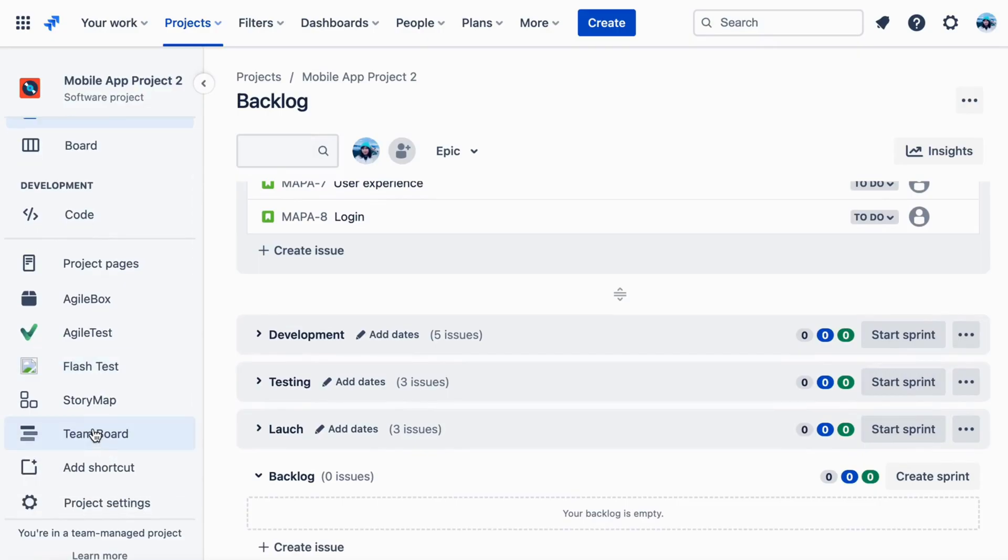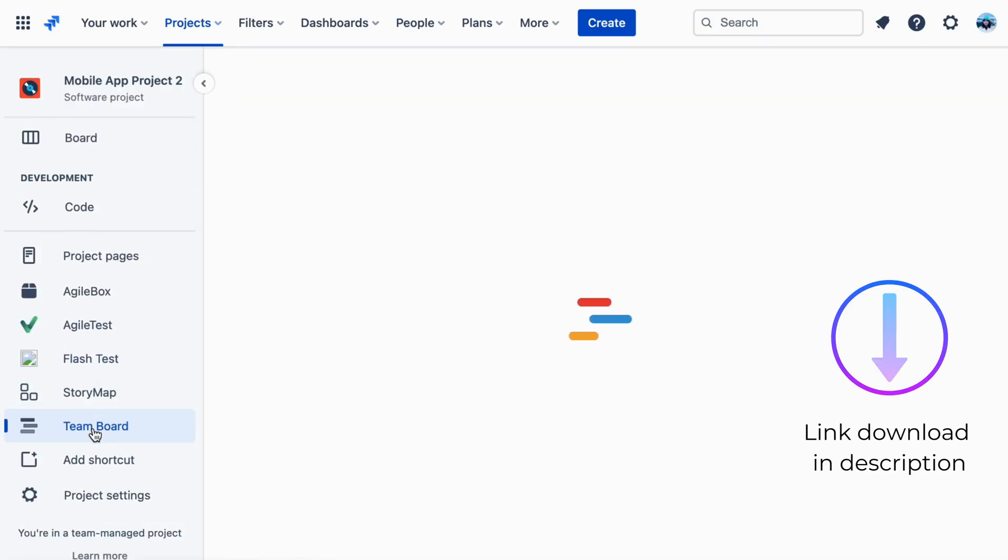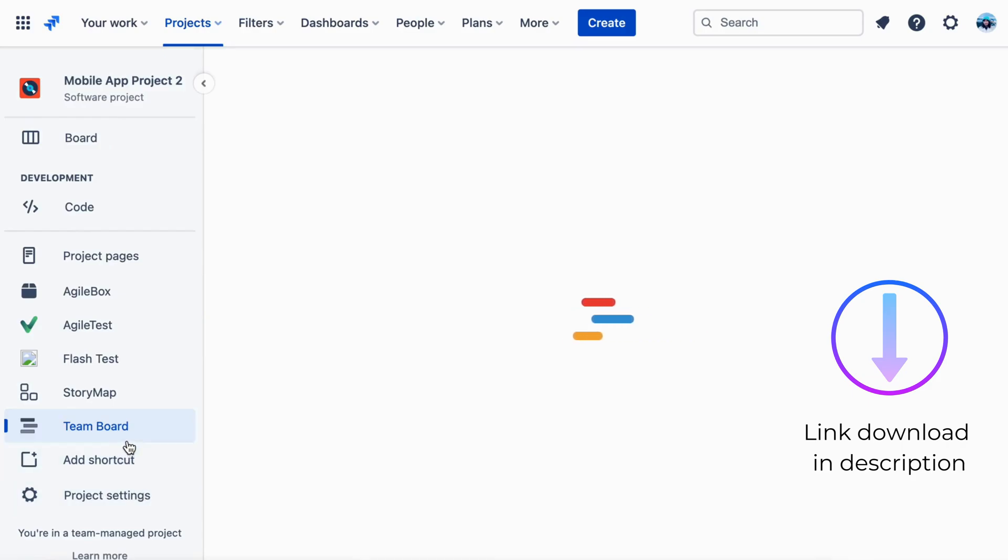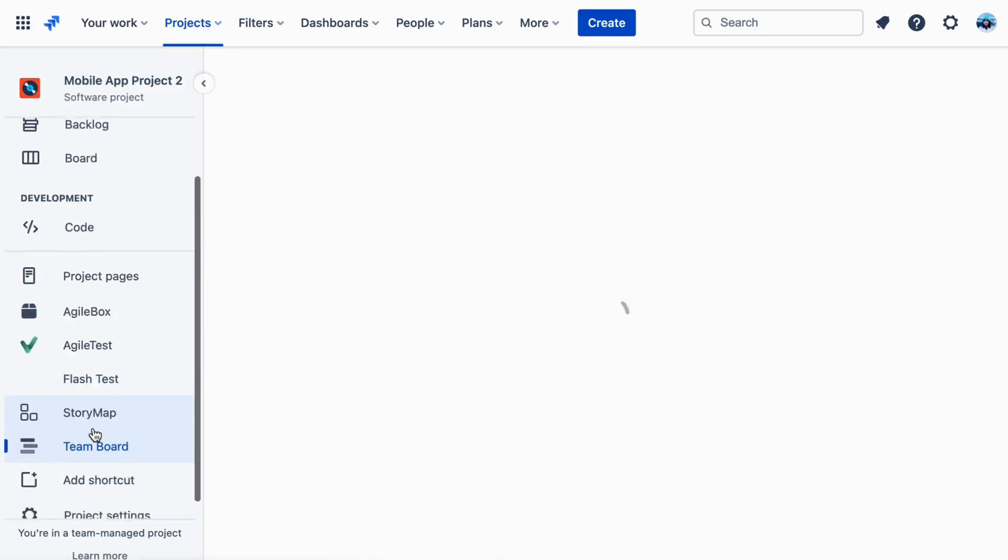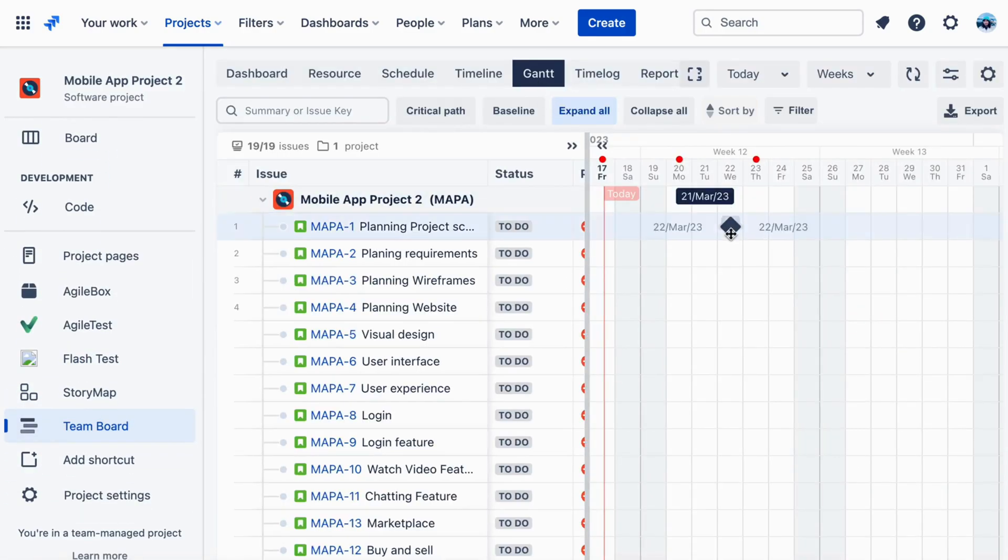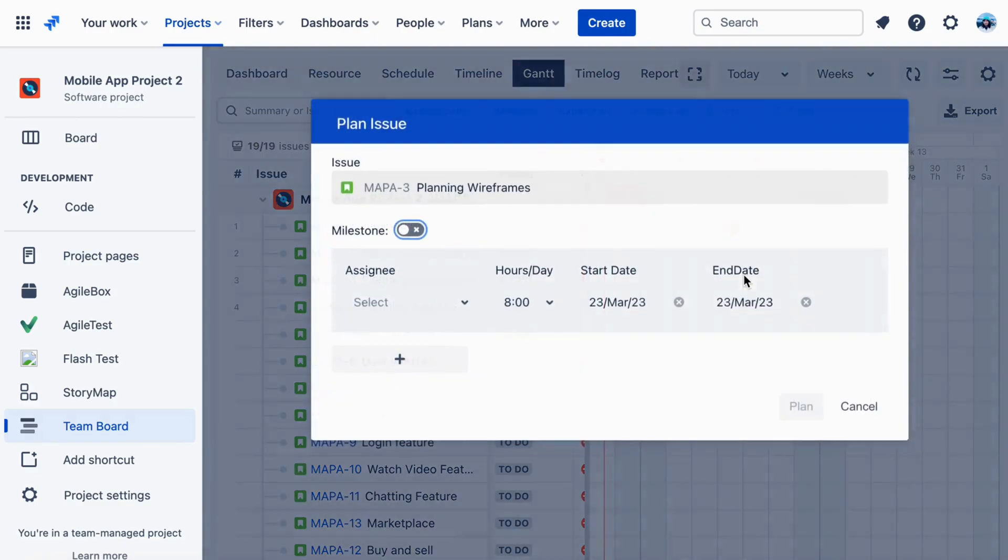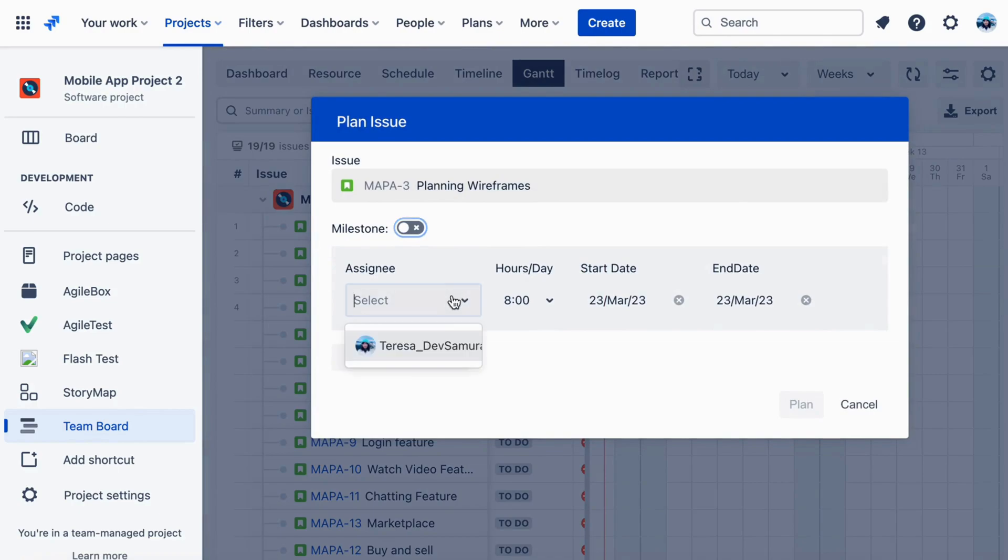Go to the board menu and select the TeamBoard tab. If you don't already have it, you may get it from Atlassian. We've added a link to the description. And then choose the Gantt view. In the Gantt chart, you can set up milestones by clicking on the screen and on Milestone.